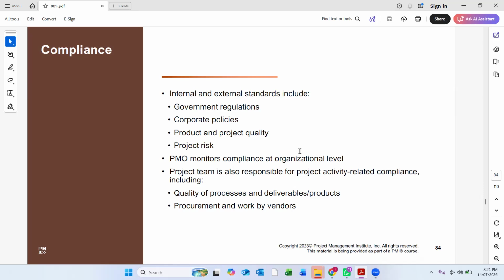You should know the risk of the project, right? You should be compliant to mitigate those risks. And what are the processes for the quality delivery? In your execution, you should maintain proper quality checks. Your method statement should be approved. Your material submittals, your material should be approved from the approved vendor list.